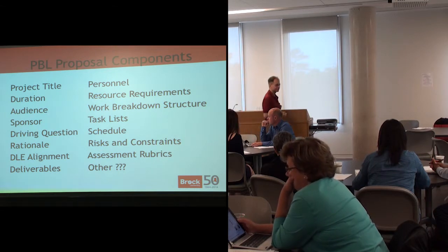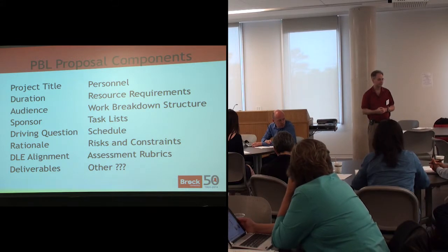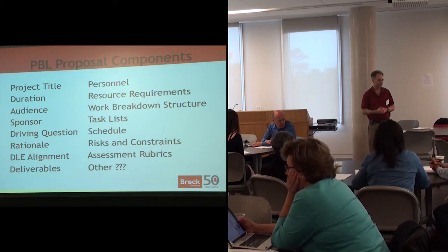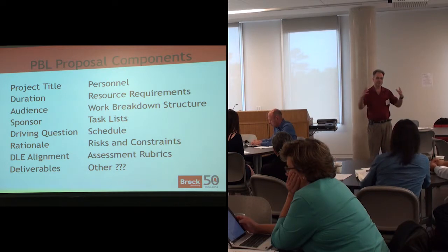And one really helpful project management tool I find that helps with that is this triangle of goal, resources, and time, right? Because those three have to balance. So if you have less time, then the goal changes. If you're going to get less money, then the goal changes, right? So that's a really helpful, simple thing. And professional project managers call that the triple constraint. So if a project expands in terms of its scope for whatever reason, then you're going to probably need to assign more resources or more time to that in order to complete it. So you could look up that concept, if you will.